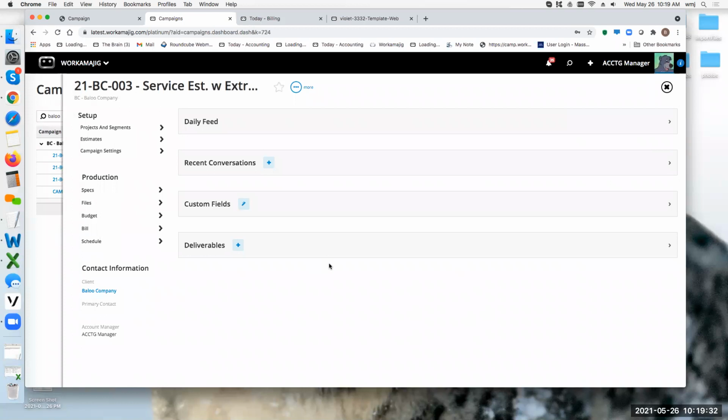Is there any type of indicator to inform actuals exceeded approved budget amounts, or does the system allow for billing over the PO amount? You're getting kind of into some very specifics here. You've got notifications out there that can be sent out based on, are you over budget or not? Are you over budget by task? Are you over budget by item? Are you over budget by the entire budget? So there's different notifications that you could have in there.